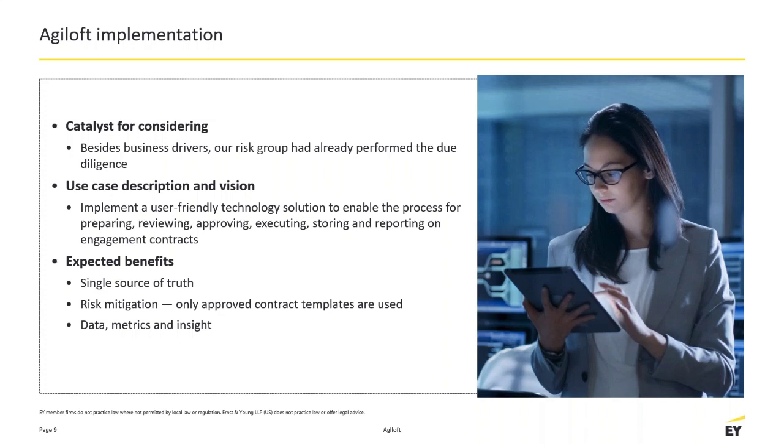And so when I came onto the project and understood all these factors, I was also handed a timeline and told, this has to be implemented by September. It had to be implemented by September 2018, actually, because we signed our deal with Agiloft in June of 2018 and started our design and implementation right away with a targeted go live of September. So like 3 months basically to do everything.